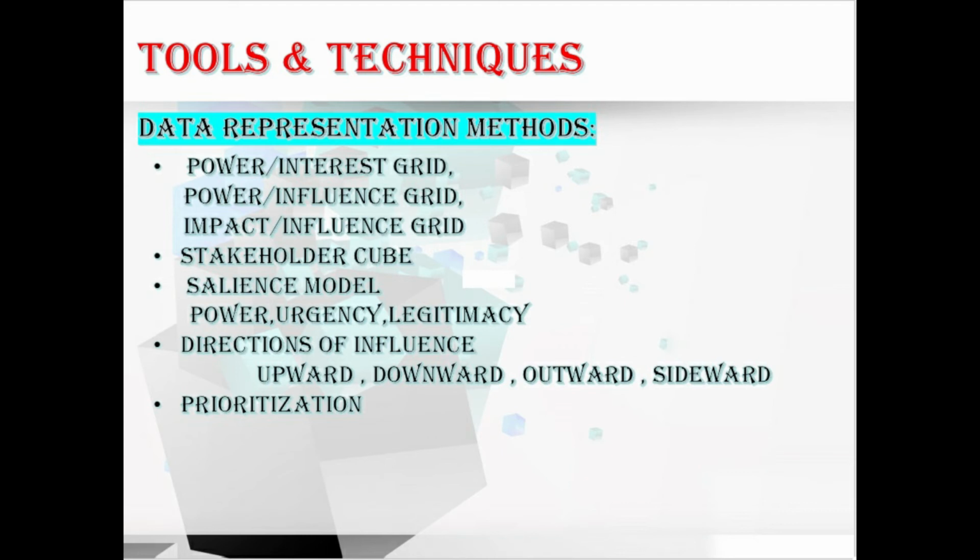Coming to the last data representation technique, we have prioritization. Prioritization of the stakeholders may be necessary for projects with a large number of stakeholders, where the membership of the stakeholder community is changing frequently, or when the relationships between the stakeholders and the project team, or within the stakeholder community, are very complex. So prioritization has to be considered. Okay, hope you understood about this data representation technique. Let's move to the next technique.